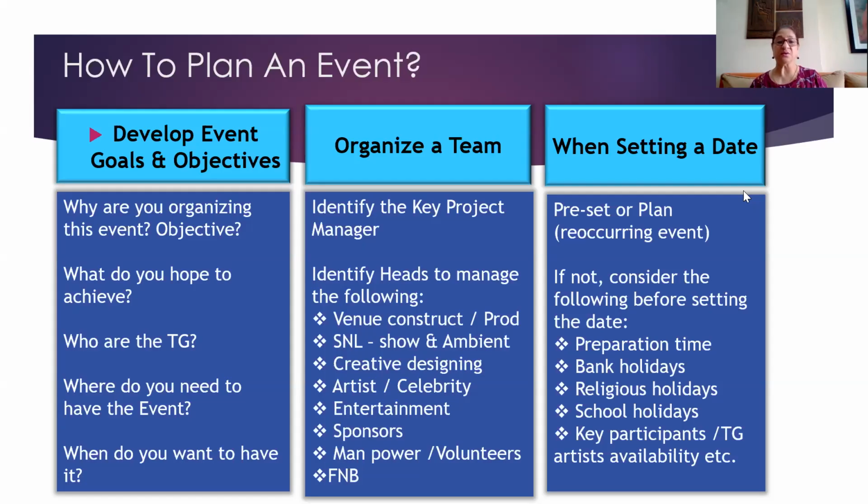Entertainment. What is your event? Who have you engaged? Is there an artist performing? Then the complete tech rider from the artist is given to the production head and the sound and light guy, so that they bring their material accordingly. Any artist you engage, you have to take their tech rider from them in terms of what they want for the band that you have to provide, and it all has to be there ready for them before they come to set up.